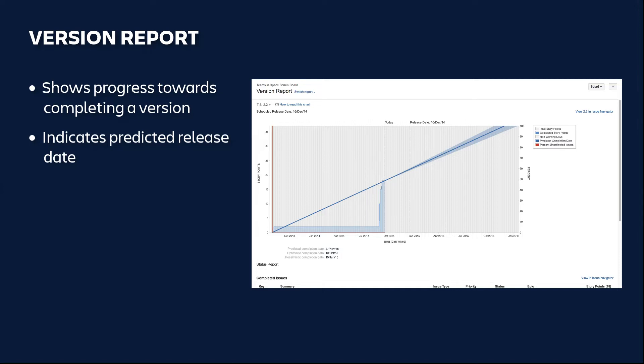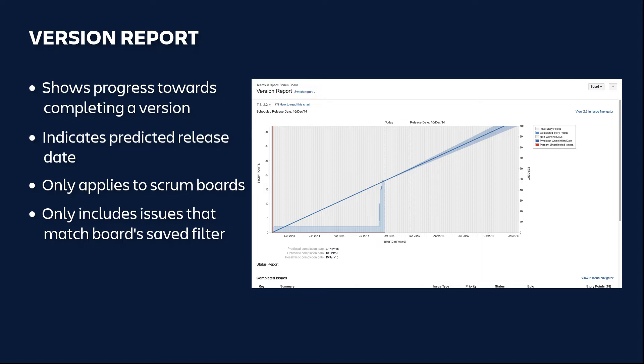The version report only applies to scrum boards and only includes issues that match your board's saved filter.